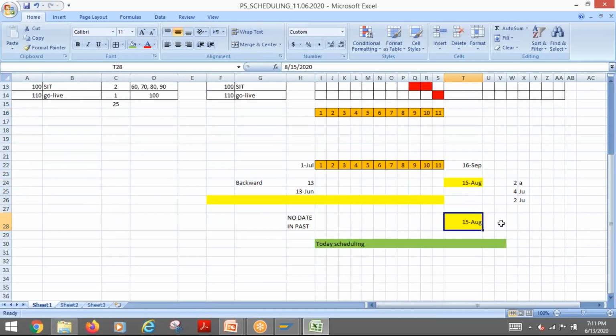So if you are giving the date, the system will tell you that you cannot finish this project within that time period. Then you have to go for some other method. What is that? You have to reduce the duration, or you have to deploy more people and do more parallel activities. You have to do some kind of time cost trade-offs.